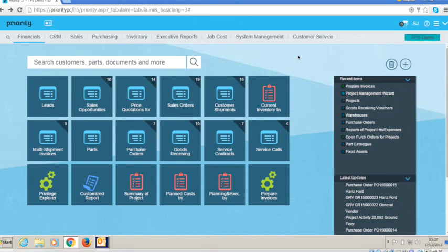So when you're ready for all of this, then you need to run the invoicing. By now you should be ready to bill, and by that I mean, have you put all the relevant quantities of labour and materials against the project? Have you set up the stage payments in the payments for the project? Once you're happy with all of that, select the prepare invoices option.